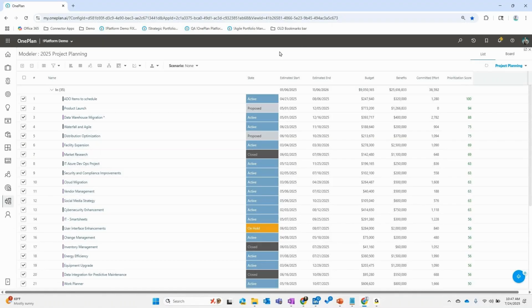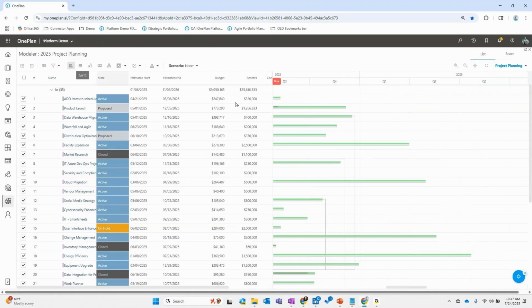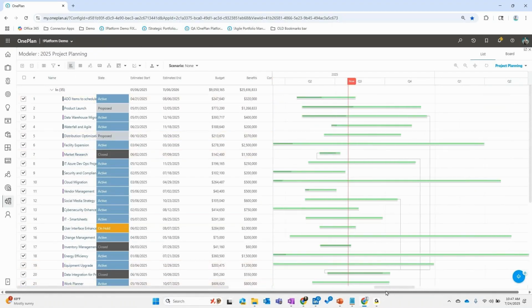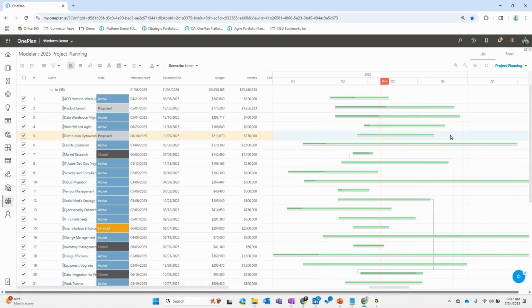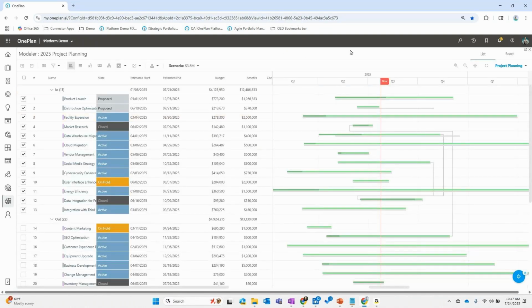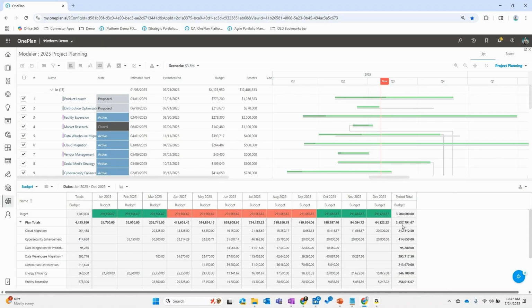But as I go through this, I can start doing scenarios whereby I select or deselect projects, right? Or I can interject a timeline in Gantt in here, and I can start moving things out and stage things in different timing to fit within certain parameters. And when I do that, I can ask, what if I have a $3.5 million budget in here? I limit to this and start deselecting things till I get down within a certain budget realm. I might do that and see that I'm down around that $3.5 million realm. I'm getting closer to that, but I still have more work to do.